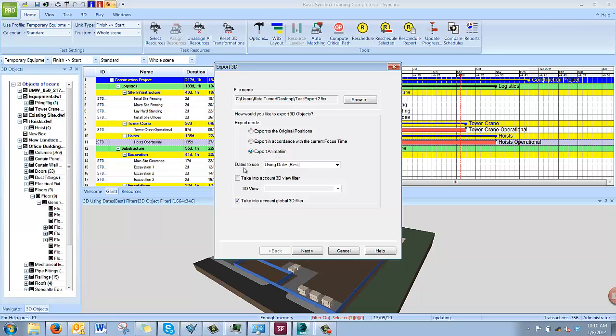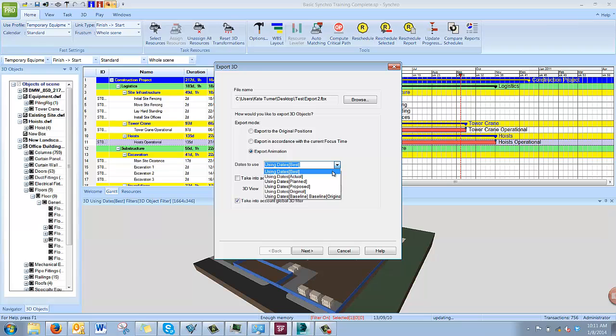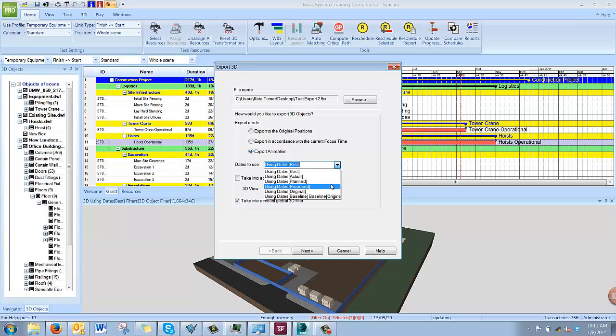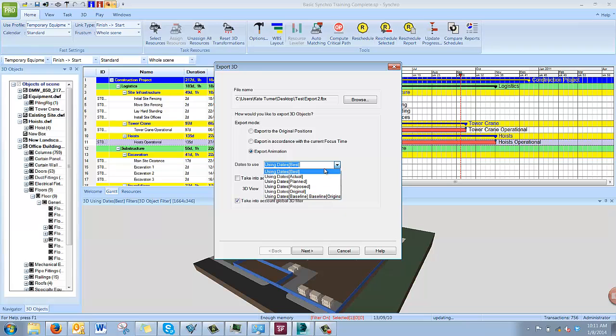You then can pick the dates to use for the animation. We will use the best dates, which combines the planned and the actual, where the actuals have been updated. You also have the options to use just the actual or just the planned. You could use the proposed dates, or the original will show you again a 3D static file. And the baseline is if you had saved any baselines in Synchro, you could export using those dates rather than the current planned dates. So we'll go with best.